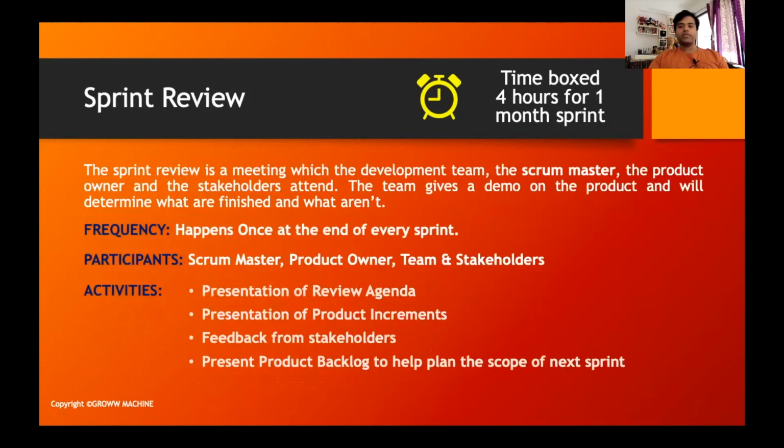Next comes the sprint review. Now, this is again a time boxed ceremony, and it is time boxed to 4 hours for a 1 month sprint. So accordingly, you can estimate that usually the sprint duration is 2 weeks in most of the organizations, and accordingly you can have a sprint review call for 2 hours maybe.